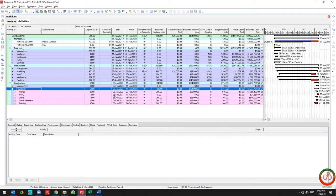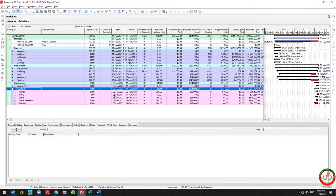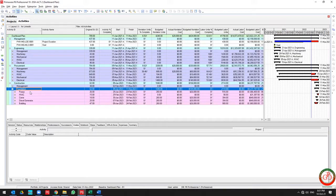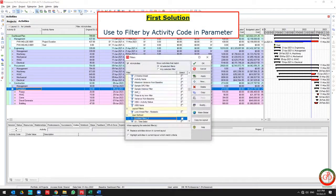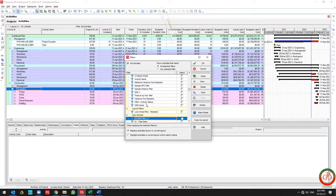How can I roll up this information? Activity codes are the answer to this question. If you've implemented activity codes for all your activities, the first solution is to use the filter.